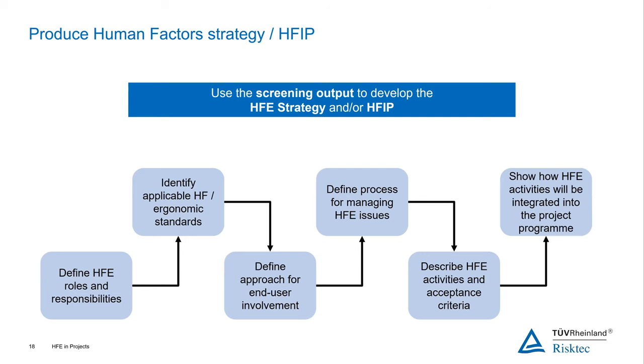And lastly, the plan will show how the HFE activities will be integrated into the overall project program. It's quite key that they are built into that program and that schedule. So again, it's an integral part of the whole design life cycle and the whole design process, and not just an add-on at the end. And I think that's the whole thing with the word integration, human factors integration into projects. That's the key here. In the past, often human factors is not considered early enough, and it's considered as a bit of an afterthought. And when you consider it too late, there's very little you can do about it, or you can't make the changes. So the key thing is, integrate it into the project at the beginning, build that into the process.